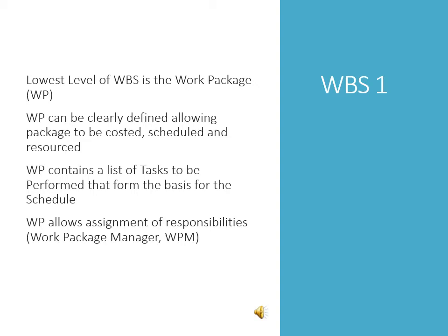The lowest level of the work breakdown structure is the work package. The work package can be clearly defined, allowing the package to be costed, scheduled, and resourced. A work package contains a list of tasks to be performed that form the basis for the schedule. The work package allows assignment of responsibilities.